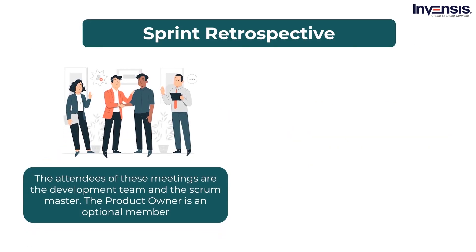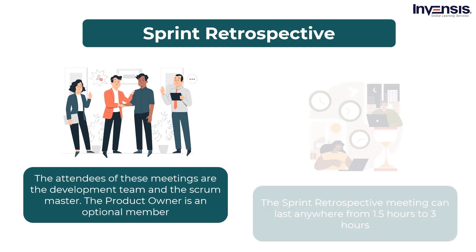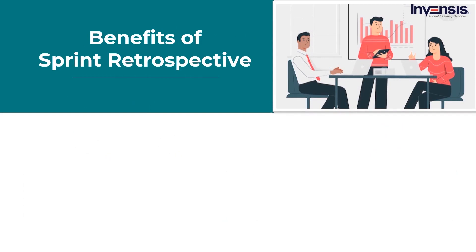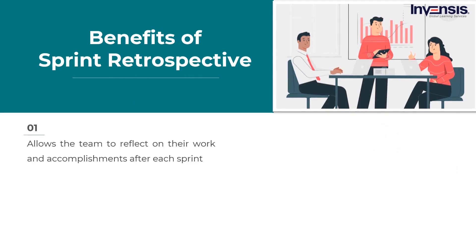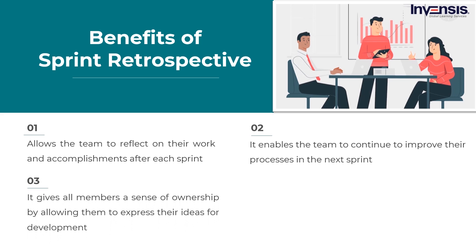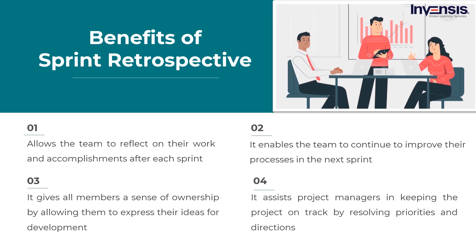The attendees of the Sprint Retrospective are the development team and the Scrum master, with the product owner as an optional member. The Sprint Retrospective meeting can last anywhere from 1.5 hours to 3 hours. Benefits of Sprint Retrospective: it allows the team to reflect on their work and celebrate their accomplishments after each sprint. It enables the team to continue to improve their processes in the next sprint. It gives all members a sense of ownership by allowing them to express their ideas for development. It assists project managers in keeping the project on track by resolving priorities and directions. It aids in the early identification of risk and issue variables and promotes transparency and trust among team members, which strengthens team spirit.